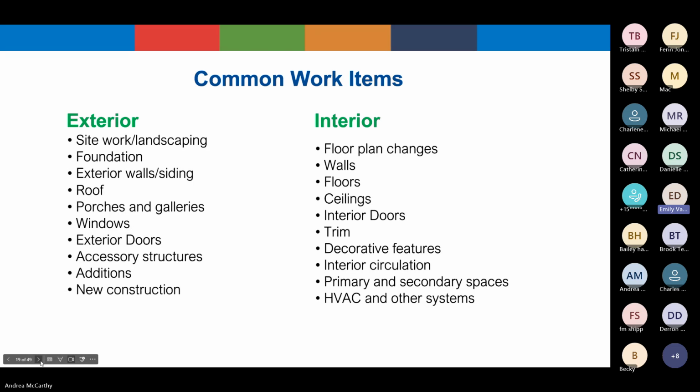Remember, the entire scope of work on the project must be addressed, including site work, additions, and new construction. All buildings on the site, including any accessory structures, must also be included. If the interior of the building has similar finishes throughout, such as in a residential building, for example, interior treatments are typically divided into more generalized categories, such as wall, ceiling, and floor finishes.